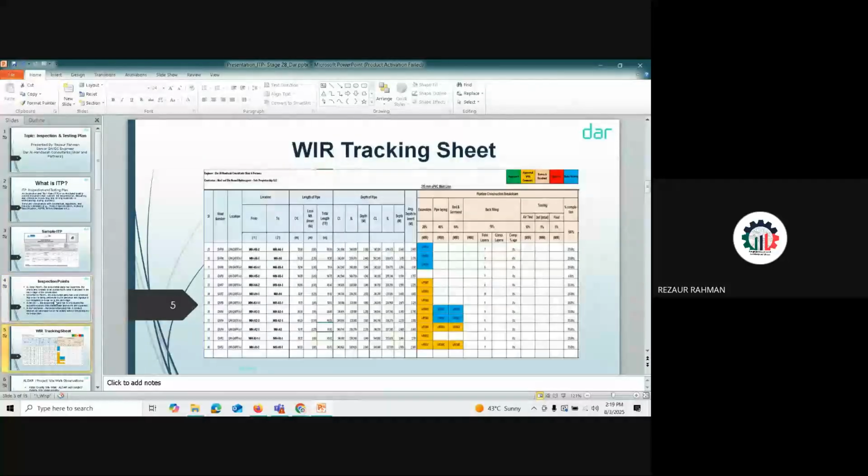Inspection point. Okay. Now WIR. The contractor is submitting WIRs. How do you know that the contractor is submitting all WIRs? Through the tracking log. The normal log that they are preparing. Normally the contractor prepares a log by WIR sequence number, not for a particular area, right? Some area is Omgaf, some area is Najir. So all are by the sequence of WIR number. So in this log, you will not know, for this particular manhole to manhole, for example 5 inspections, whether they all submitted or not.